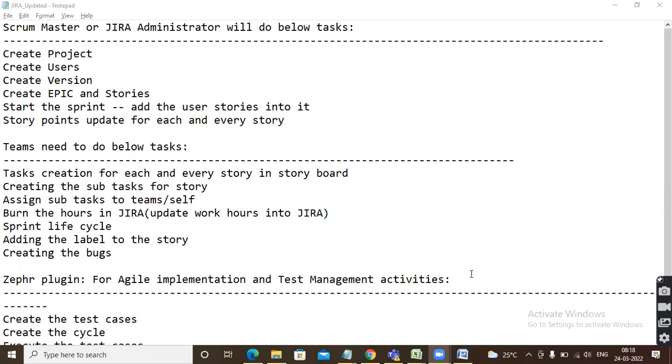If we are able to complete it in 1 week, then they're going to make that sprint 1 week and we are releasing something. Otherwise, normally 2 weeks is the sprint duration, and whatever we want to deliver, we can deliver in those 2 weeks. That is completely decided by the product owner and Scrum Master. Okay, yeah. So that's fine.